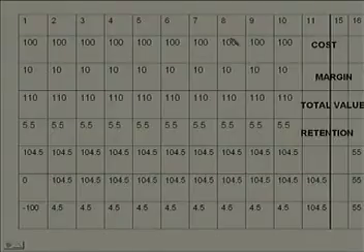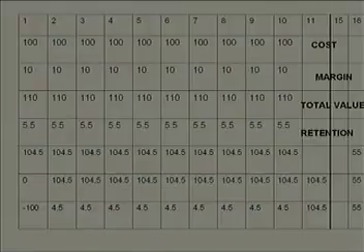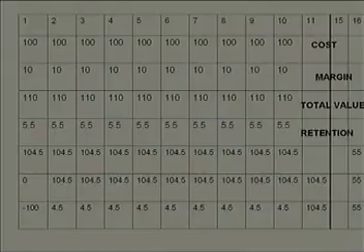That means, for month 1 I have spent 100, month 2 I have spent 100, month 3 I have spent 100. Like this I have assumed up to month 10, because project duration is 10 months. Now, I have further assumed that margin is 10% of the cost. So, if 100 rupees is my cost, my margin is going to be rupees 10. So, this will also be there throughout the project duration. For month 1 it is 10, month 2 it is 10, month 3 it is 10, so on till month 10 it is again 10.